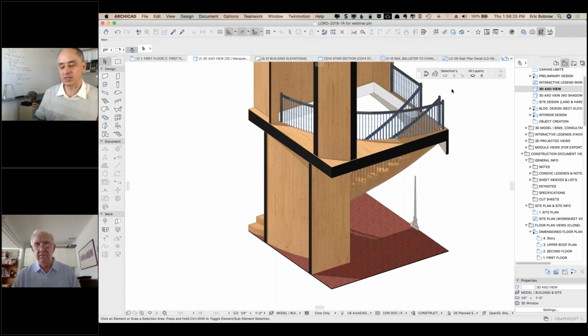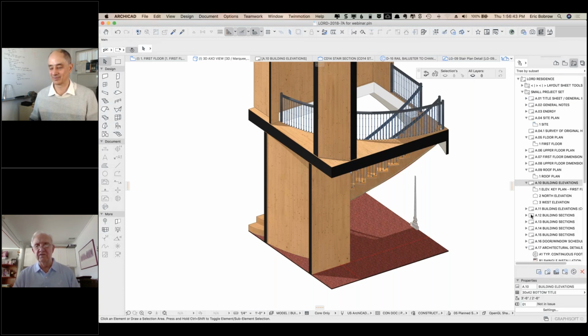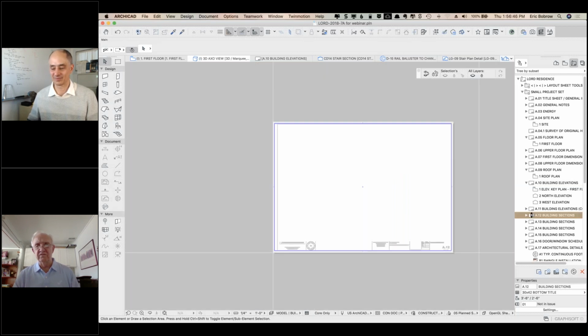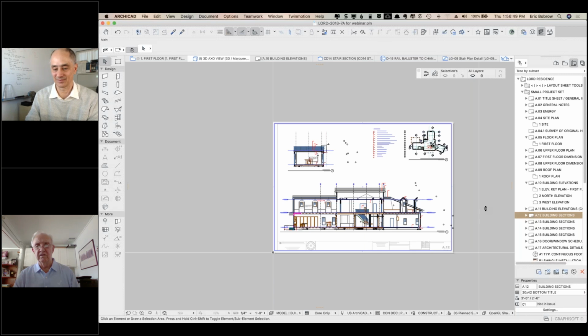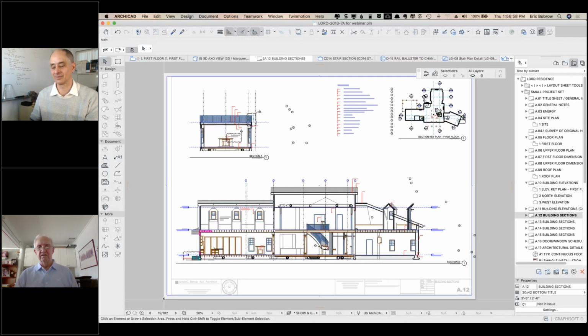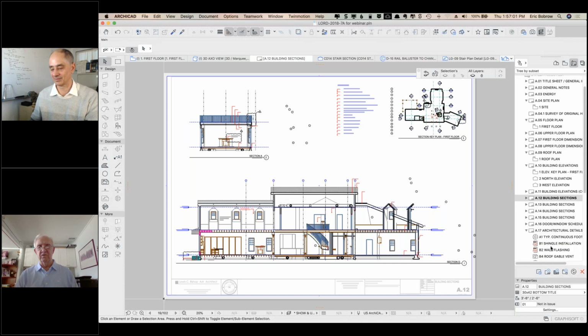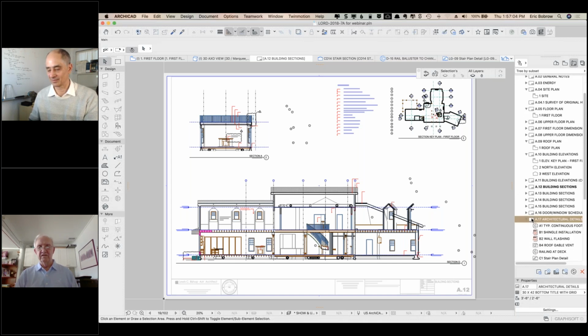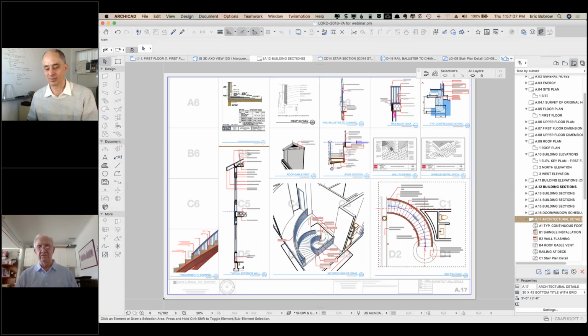So nicely done, and trying to figure out now how you can get it to fit into the budget is a good challenge. It's always a challenge. You can do all kinds of designs, but if you can't afford to pay for it, something doesn't get done. I hope to be able to. I've created a concept to do the stringers out of glued and screwed laminated pieces of 3/8 plywood, put together by building a temporary wall of shoring like they used to build domes in Italy back in the 1300s, and try to do something to hold things together and be able to form the 2 channels. So it's been an interesting project and an interesting job.